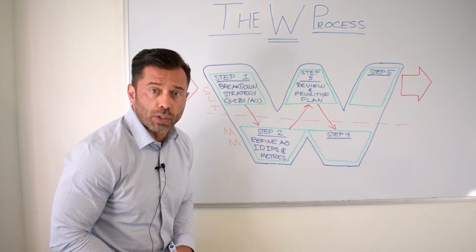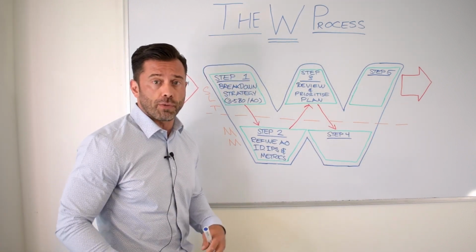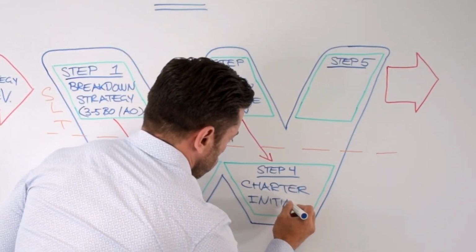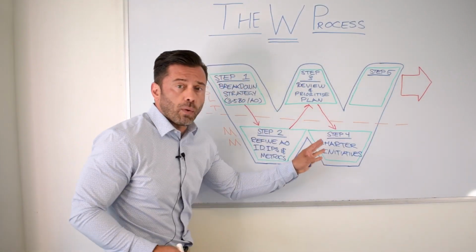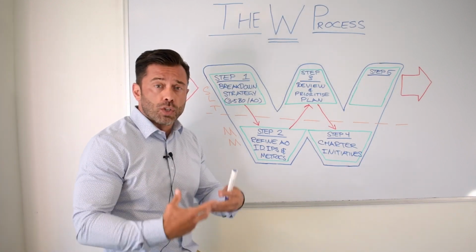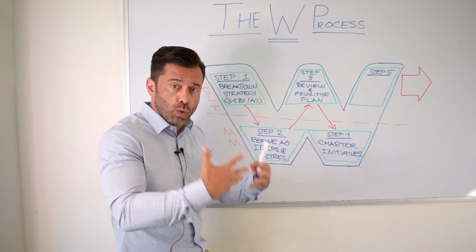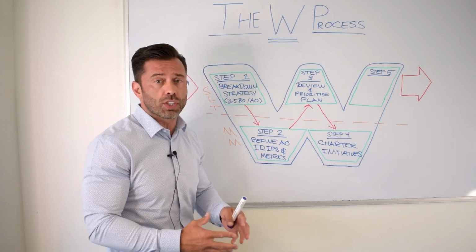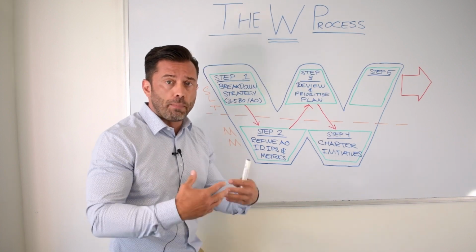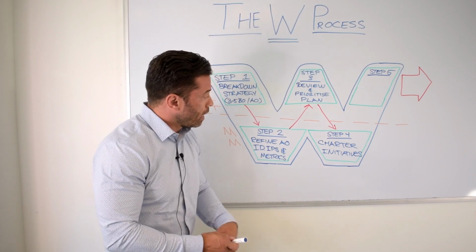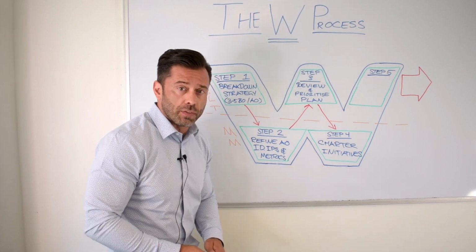Here, the middle management will start to charter the different improvement priorities. A typical exercise here would be to start writing down project charters so we understand what we want to do with the different initiatives, what is in and out of scope in those initiatives, who's going to take part, by when, so timelines, risk and issues, and action planning is what we do in the charter initiative step.